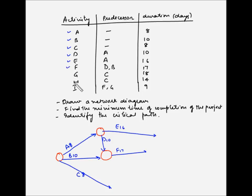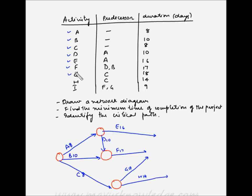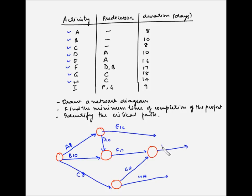Next are G and H which are dependent on C. This will be the ending node for C, and from here I draw G and H. G takes 18 days and H takes 14 days. Next is I which is dependent on F and G, so I draw the ending node for these and from this node draw I, which takes 9 days. Since I is the last activity, it ends at the finish node.